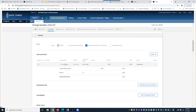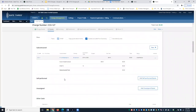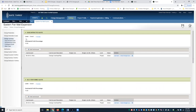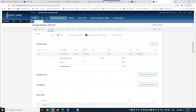You can see that the 10% overhead and profit was pulled in from our settings. Right now we're waiting to get a response from the subcontractor, so the quote has a status of Under Review. Once you receive the quote and want to log it, you can click on the quote number or click the ellipses on the right-hand side and select Open Quote.